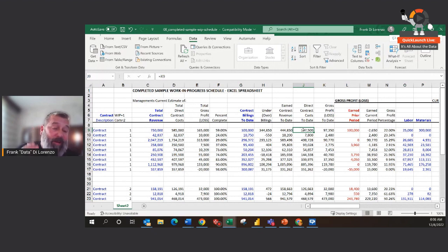In fact, I can tell you from all the consulting I've done in the construction space, what most companies do when they have that doesn't look right to me on that particular contract, they'll go back to their ERP, they'll run a historical transaction report and try and marry up all those transactional details, the totals to this total here. If it matches, great, but if not, you're spending hours. That's where you get really time lost just trying to validate, and two, make decisions on data that may not be accurate, and that comes back to get you later. So there is a better way.